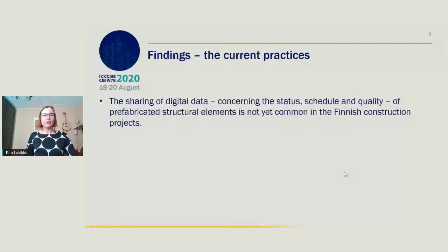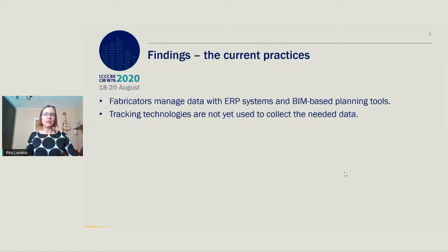The findings on the current practices reveal that the sharing of digital data concerning the status, schedule, and quality of prefabricated structural elements is not yet common in Finnish construction projects. Although the construction stakeholders, especially fabricators, manage data with enterprise resource planning systems and BIM-based planning tools, tracking technologies are not yet used to collect the needed data.